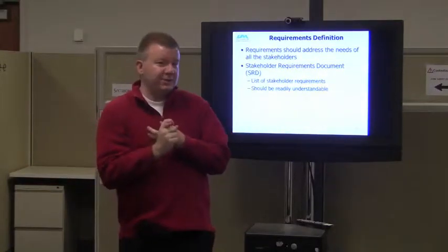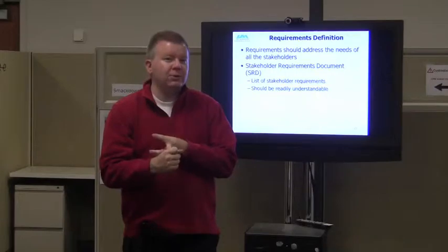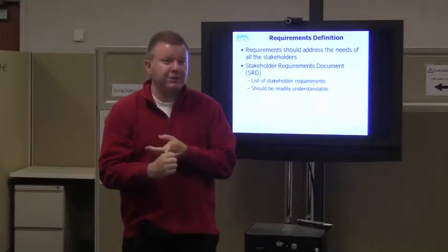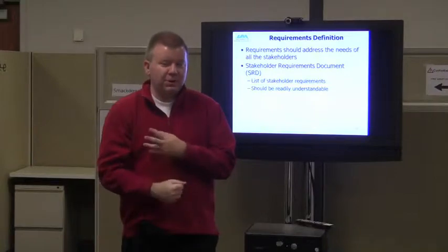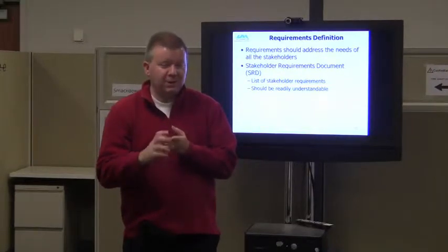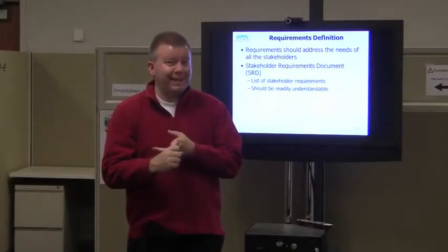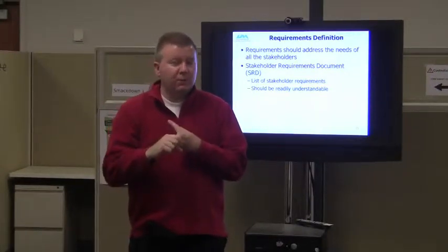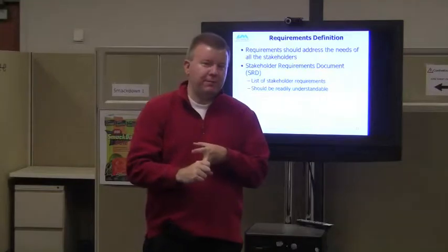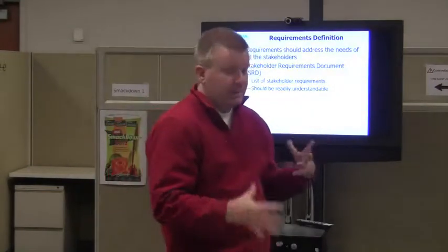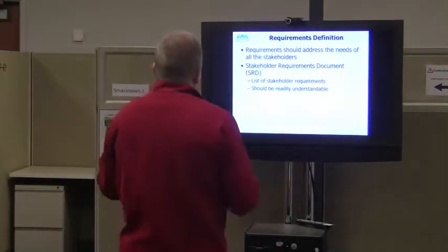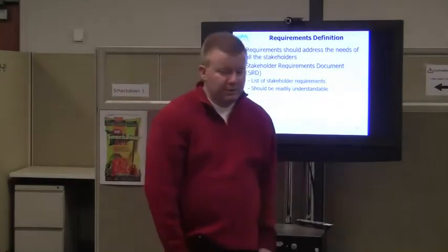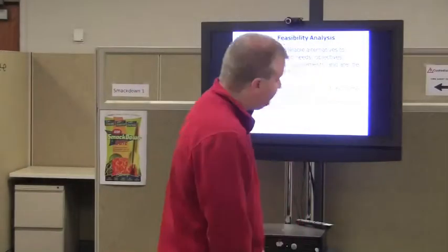And this is where English is fun, because the stakeholder can say something, you write it down, and it still means something totally different to you. So the best way I've always learned to do this is when I sit down with a stakeholder, I regurgitate back what I think that meant, in my own terms. Therefore, we clearly have it all defined up front, right? So that's that document. I just call it a list, but they have it as a document. I don't particularly do that. I've never seen that happen in the real world.